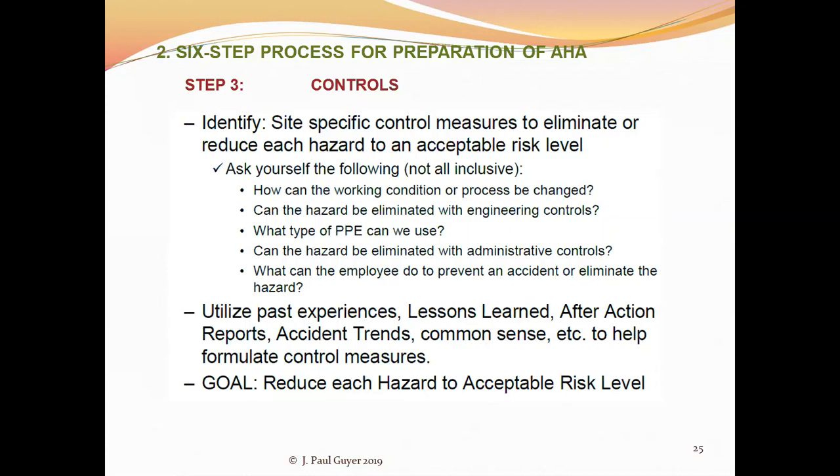I pointed to the fact that these activity hazard analysis forms are a good piece of archival information, but after action reports, okay, just the construction superintendent sits down after the project is completed and just writes out, well, this is what we did, that worked pretty well. This is something else we did, didn't work out that well. After action reports. Accident trends,